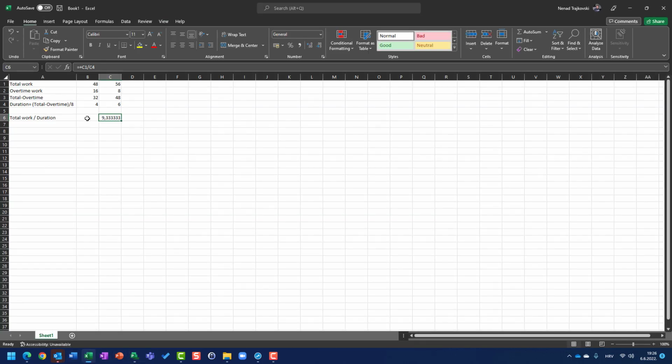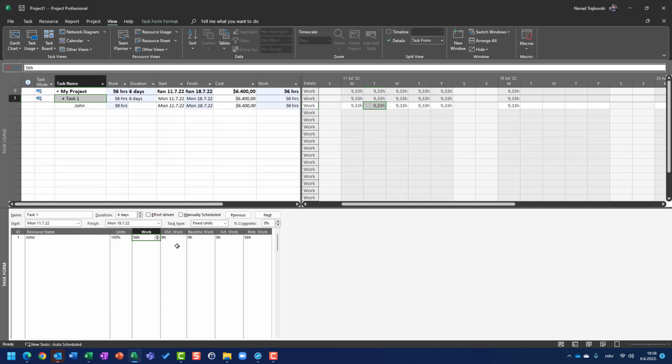Now, let me finalize this video. If I copy this cell, I will see that if I have total work 48 hours and overtime work 16 hours, then the total work per day is going to be 48 divided by 4, which is 12. So 48, 16, now duration is 4 days, 12 hours per day. So be aware, overtime work is how many hours the resource is going to work overtime according to total work, which is written here.